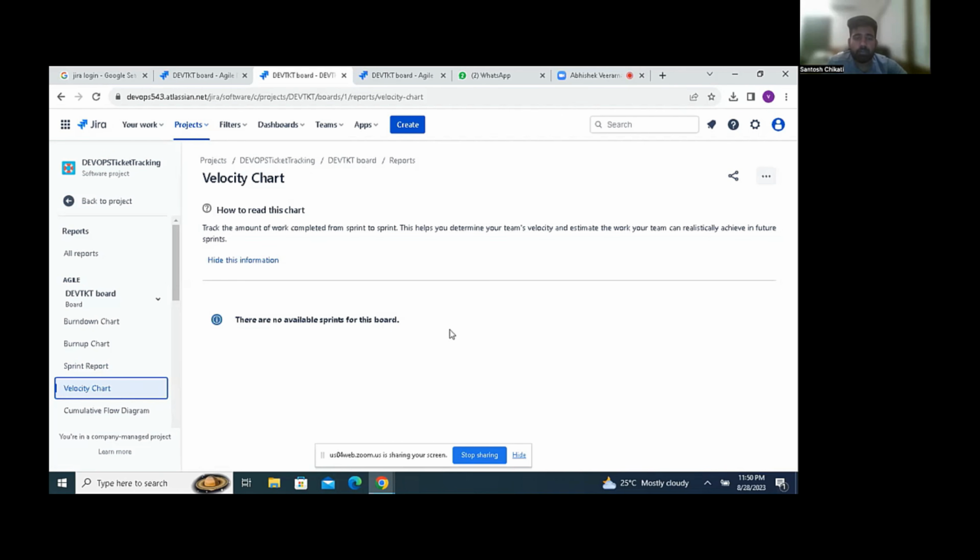This will give you the team's velocity, average velocity, committed versus delivered. Like 18, 22, 24 is the committed, and the delivered is 16, 20, 22 something. And they'll sum it up and say this is the velocity.